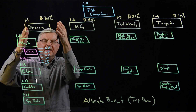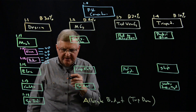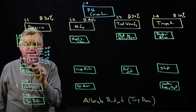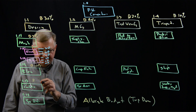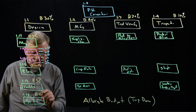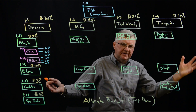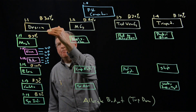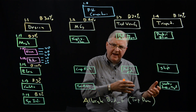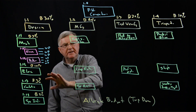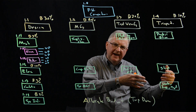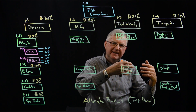Looking down into design, realizing 30% of the budget is spent on design, project management might say 7% goes to mechanical design, 10% to electrical, 5% to controls, and the remaining 8% to systems integration. We carry that throughout the entire work breakdown structure. When we add up the budgets for each item, we get the total project budget. As we execute the plan, if we find we're overspending in some areas, that forces the project manager to look at other areas in progress or not yet started and remove money from those budgets to compensate for the overrun.